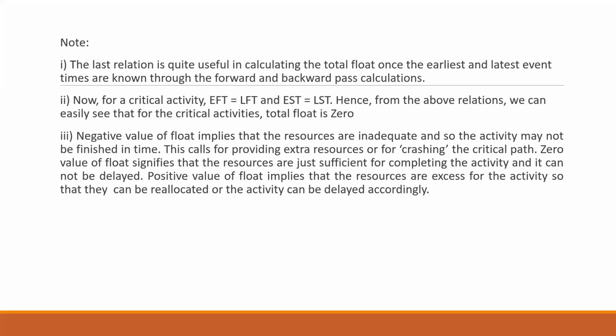Whereas a positive value greater than 0 of float implies that the resources are excessive for the activity, so they can be reallocated or the activity can be delayed accordingly. So wherever we have total float greater than 0, those activities can be delayed depending on the requirement. And if it is negative, then we need to perform crashing or shortening of that particular activity, also known as compressing.